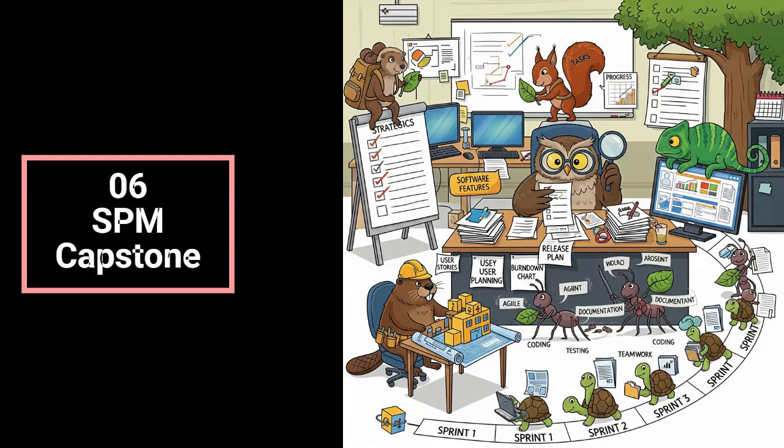We also get assignment 5.0, release burn down. Okay, so now we have data from more than one sprint. Exactly. So this chart tracks the overall progress across multiple sprints. Are we on track for the final goal? Right. While the iteration burn down is for a single sprint, this gives you the bigger picture, the bird's eye view of the whole release. And there's a lesson on release burn down charts, naturally. It provides that longer-term view, helps spot if you're drifting off course for the final deadlines.